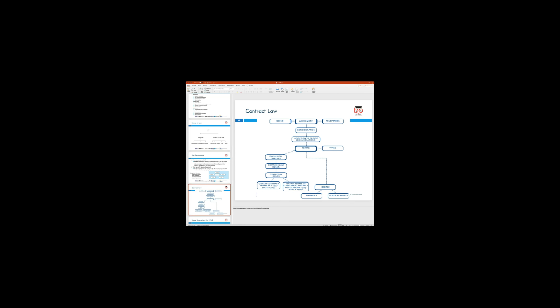Now, when we look at terms, there are lots of different terms which can be in contracts. There could be terms which have some exclusion clauses. So when you hear of clauses like an act of God, what I mean by that is you look at if there are earthquakes, fires, floods, things which are beyond your control, which are natural or environmental situations which cannot be controlled, then sometimes you would see these are included in the contract as what are called exclusion clauses.